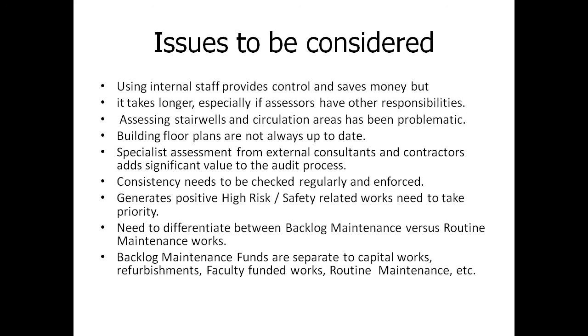And then finally, the backlog funds, keeping them separate to capital works. It's very important, as it's a true reflection, really, of how funding hasn't been attributed to the building, and also whether a full refurbishment or rehabilitation will help solve and resolve a backlog or a deficiency of items within the building and within the building elements.